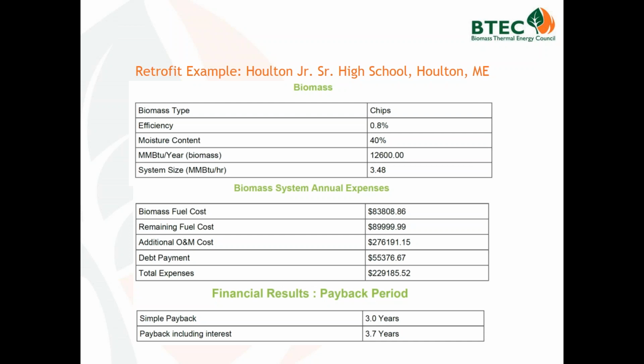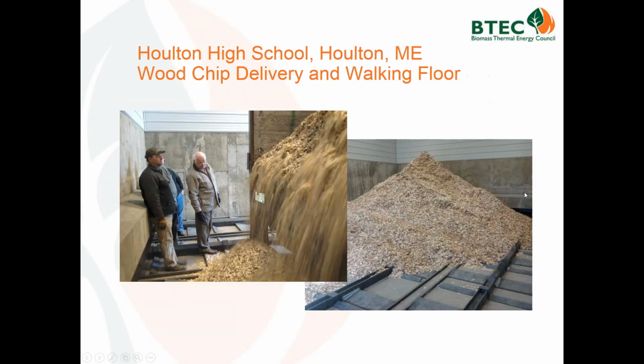The remaining fuel cost you see here, we're really only gunning for about 50% of the total energy bill, dollar bill. More than that for the actual percentage of the heating being done, but not all of it being done with wood. It shows the additional operation and maintenance cost, debt payments, and so on. And for this case, this is the real nut of it. Had I used this tool up front to qualify the project with these very simple inputs, simple payback of 3 years, and with financing 3.7 years. So that's pretty drastic, a pretty important project, and would have told me to go ahead.